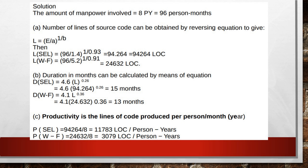The third question is to identify productivity in lines of code produced per person-year. Productivity equals total lines of code divided by person-years. For SEL: 94,264 ÷ 8 = 11,783 lines of code per person per year — meaning each person writes 11,783 lines per year. For Watson-Felix: 24,632 ÷ 8 = 3,079 lines of code per person per year.